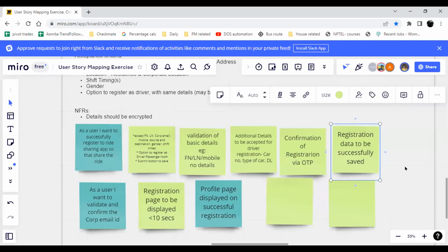Right. So it should be commonly understandable for the whole team, and the product owner should be the one who says, yes, this is the story, we can go ahead with the implementation. Okay. Exactly. So the ownership basically falls on the product owner. A developer should not modify the user story. He can raise a concern with the product owner and a BA, and then they can discuss and update the user story. But a developer by himself cannot update it.